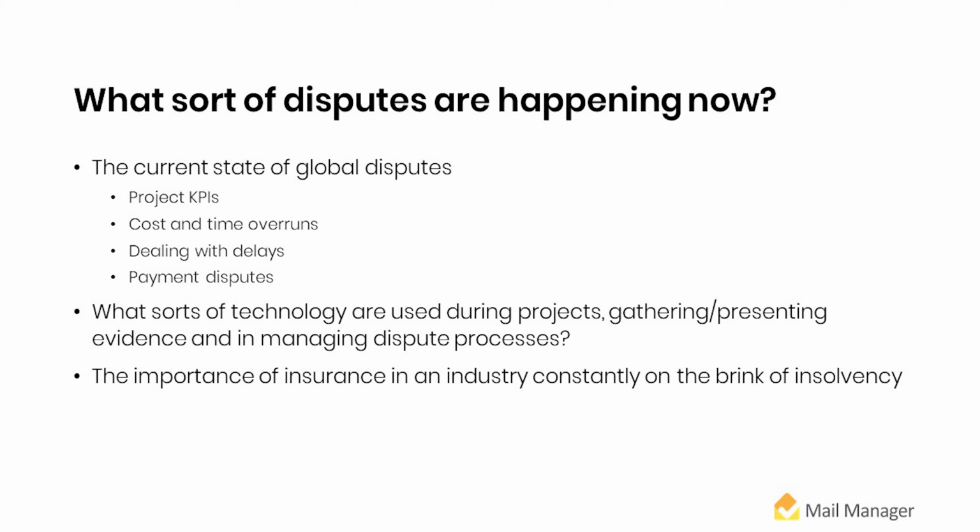But on a more general basis, I think over the last few years, the biggest source of dispute, and you'll find this in the Arcadis annual disputes report, is people not complying with the contract. So where people aren't serving the right notices, or complying with the contractual obligations. Sometimes that's because the obligations are quite vague and the understanding may be different. You'll find that with, say, BIM, where someone may be asked to achieve level 2 BIM. Well, what does that actually mean? But it's not specific to that area. And I noticed in the last 2 or 3 Arcadis reports, it hasn't actually changed, that the big disputes are simply compliance with the contract.